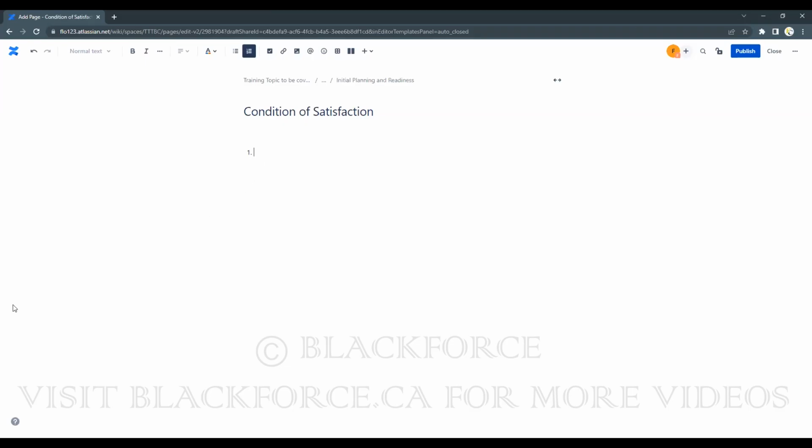Okay, Erica, I can see that. Number of new customers. That means for you to know that you're having new customers, you need to do a baseline measurement, right? So what do I mean by that? At the moment, you will know the total number of customers that the Flaky Music app currently has, so that when the new application is in place, you'll be able to measure if you are having new customers or an increase in the customer base, okay? One more.